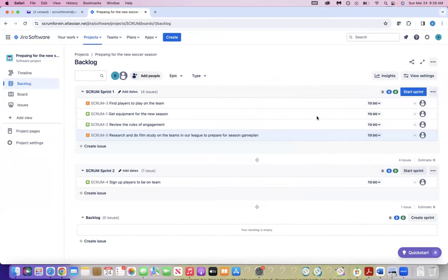So when you go into the board, you'll notice when we estimate that there is no option for 4, for 6, or for 7. Typically, spikes, I don't think they're typically estimated. I know they aren't with my teams, because they are applied to the effort that is allocated to the story that it's a part of.